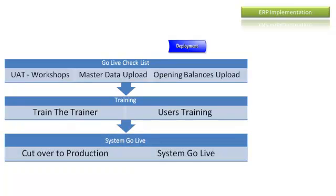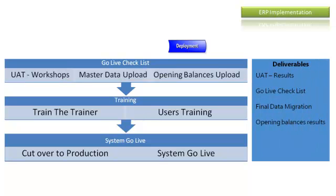Once master data is uploaded, opening balances are uploaded, and users are trained, it's time to go live — cut over to production. The deliverables of the Deployment phase include the user acceptance test results, the go-live checklist, and the final master data migration and opening balances results.